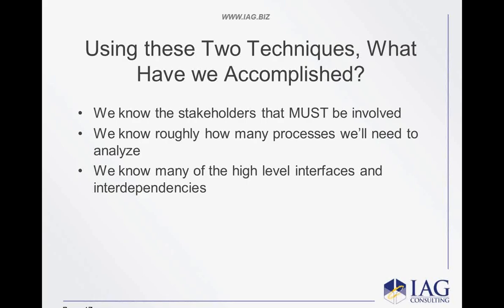And the reality is that oftentimes it's not just one person. Oftentimes it is a group of people that have to come together and decide how something is to be done. And that's where the complexity lies. When you go down this path, you identify those areas where there are multiple stakeholders interacting with a single process. You don't have the ability to just go to one person and get the answer in that circumstance. You have to work with the team. And as a result, you need to know where you're going to ask management to give you more people.